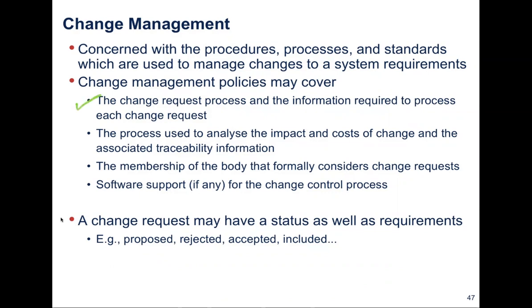In addition to this, it may even cover the process used to analyze the impact of the change and the cost of such a change and the associated traceability information. This could be in the policy. In addition, we could see the membership of the body that formally considered the change request.